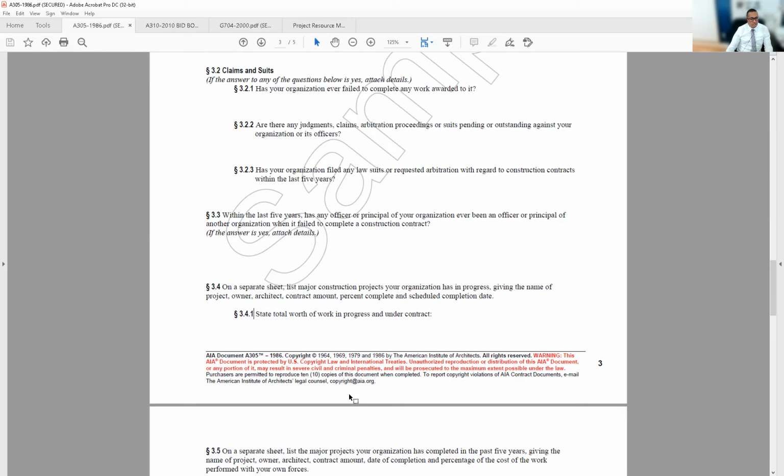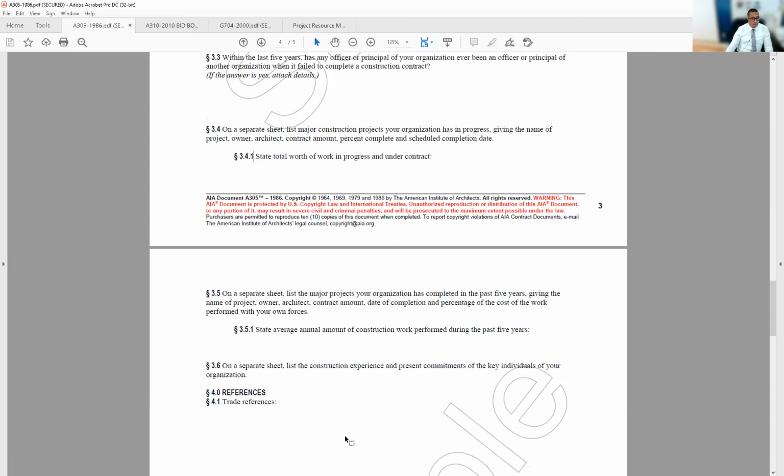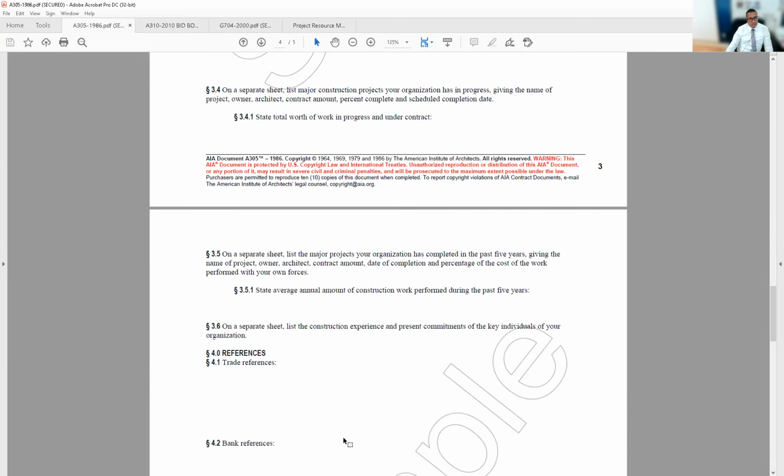Because contractors actually do finance some of the work as it moves forward, because we don't pay them all of the money right away, right? The owner pays an initial deposit, and then upon certain requirements being met, they get another payment, like a portion of their retainer and a portion of their money. So essentially, they do work with their own money for a little bit. They shouldn't put in a lot of it, and that's why the contract is divided into certain progress completions by month, and they should complete each by month so that they can get payment.